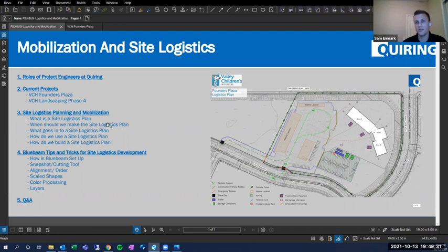So it really makes a huge difference on where you can put your material and how long it takes you to get to your material, and the flow that you have to go through to get from there. So for instance, if we've got our material laydown over here, and we tell the subcontractors, hey, this is your only material laydown that you can possibly have, this is going to be a long trek for them to get back and forth between these two, right?